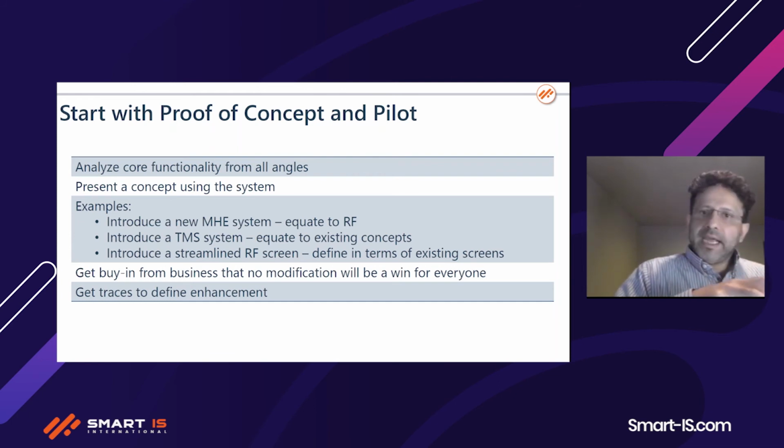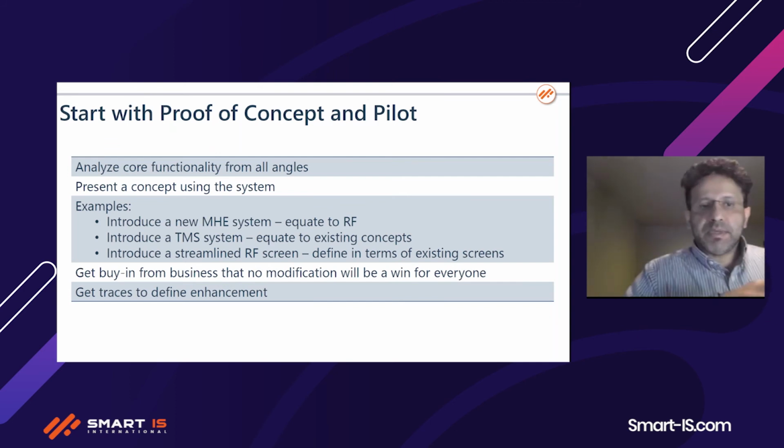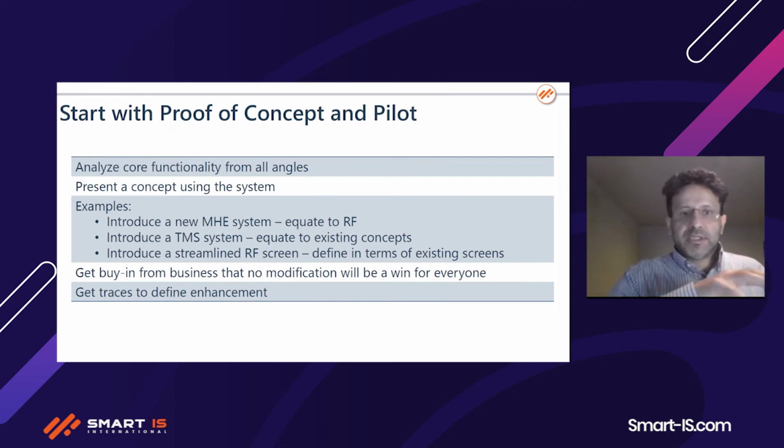So it could take maybe sometimes 2 weeks, 3 weeks, or in certain cases, it might just be a 1-hour meeting where all parties involved agree on what we are talking about. And that must always be the first step before anything is done. We present a concept of how the user is doing it, and this is what is going to be implemented in the system. And we get the buy-in from the business on that proof of concept.